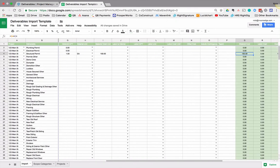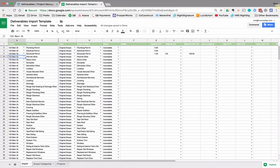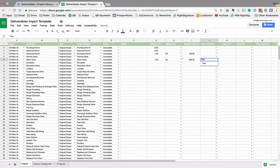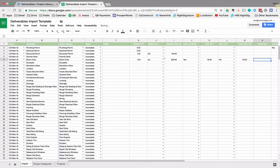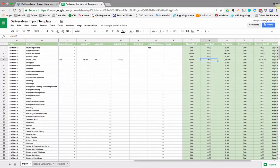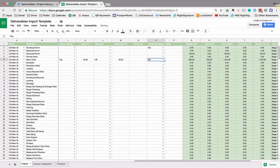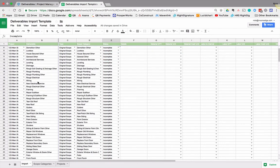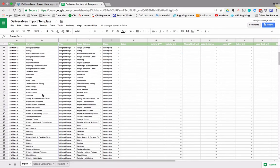You can indicate for all these deliverables too, whether we're going to include the contingency, which is a 5% on this project and get all that sorted out as well. So demo crew. Here, let's say I need a dumpster. So let's go one each at $550 and then labor. Let's say it's internal labor and my labor quantity. Let's say I got 16 hours and I got maybe two guys, one at 20 bucks an hour, one at 25 bucks an hour. So let's say $45 an hour. So my budget for demo is currently $1270. And if I include my 5% contingency, we'll add that on as well. So this allows us to start building out the scope ahead of time and your project manager is going to be forced to think about all these things before either putting in zeros or putting in actual numbers.